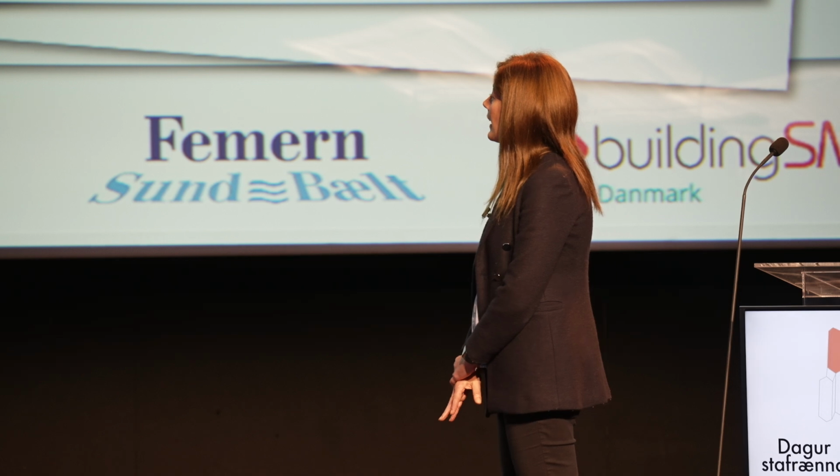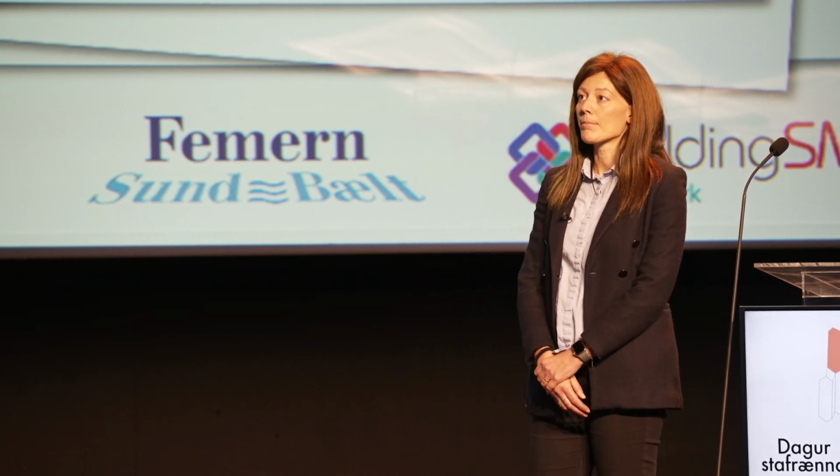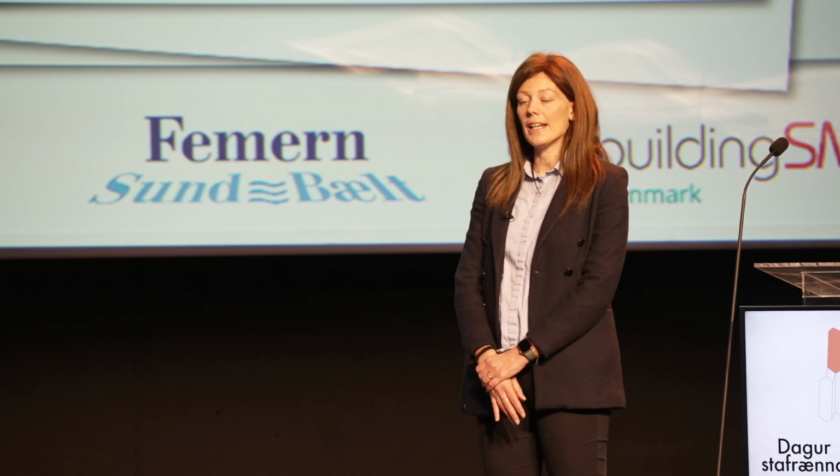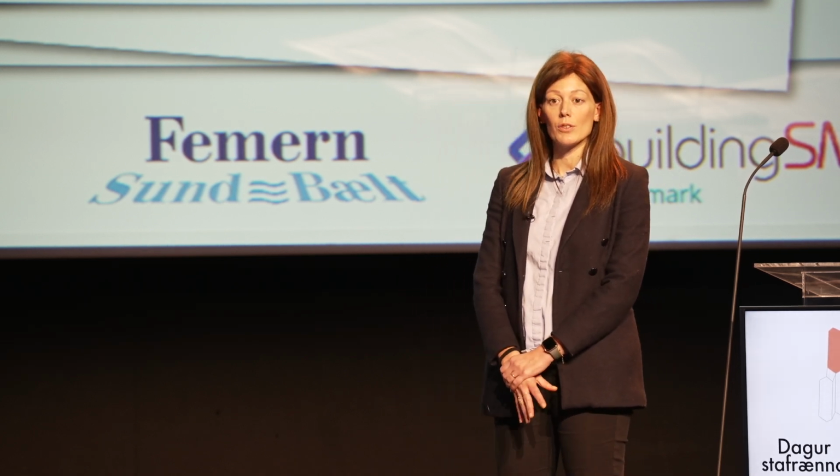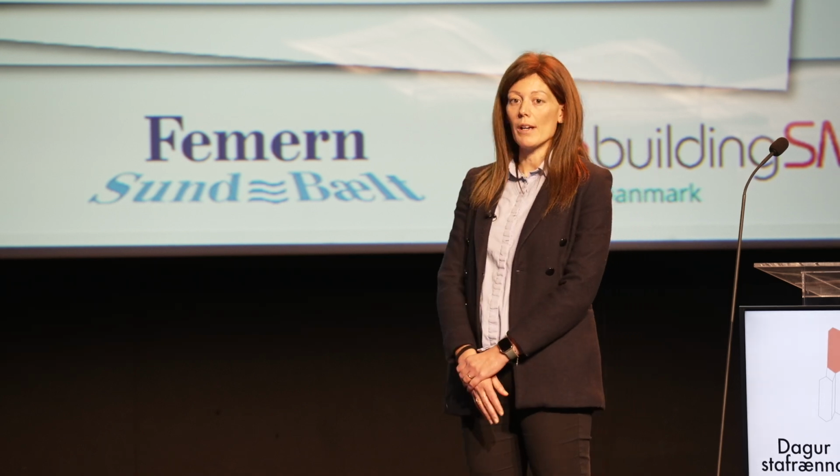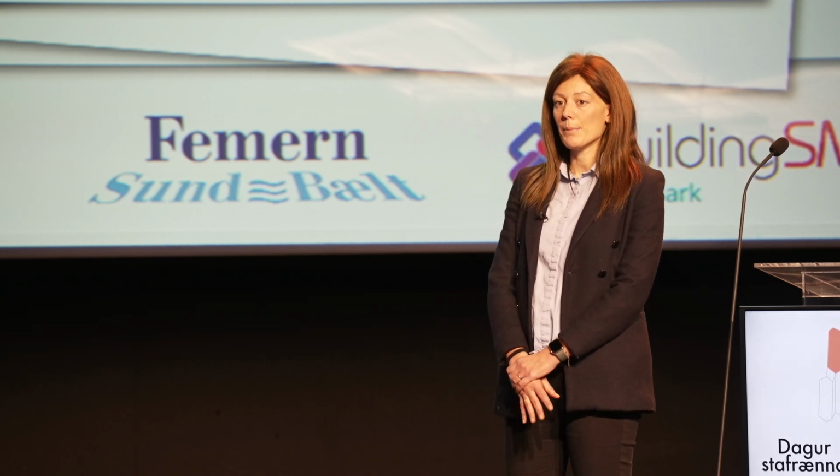And then we could also, in a future project, consider circulating a simplified IDS at the early stage of the project so that the contractor knows which requirements they need to set up from the beginning.